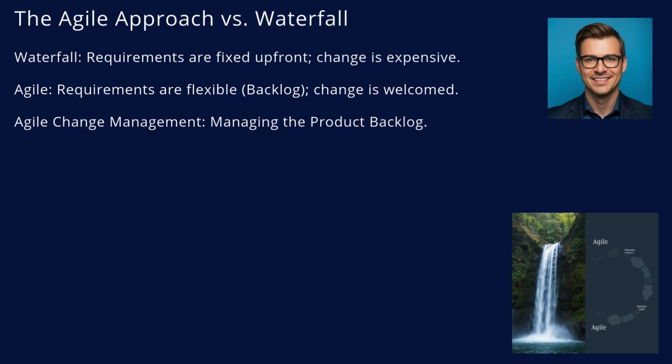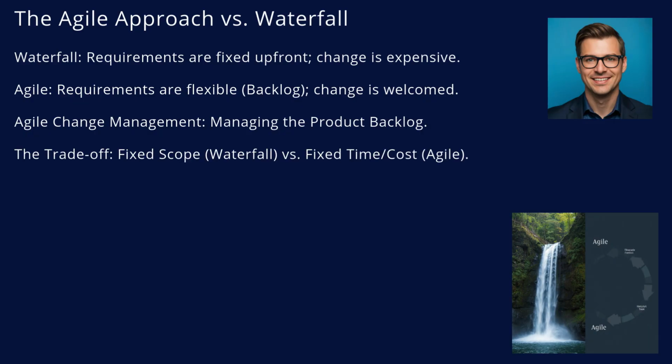If a new requirement comes in, it goes to the top of the backlog, but something else might drop off the bottom to keep the timeline fixed. The trade-off is usually between fixed scope, waterfall, and fixed time, cost, Agile. Your skill as a consultant is knowing which approach fits your client's culture and the specific problem you are solving.